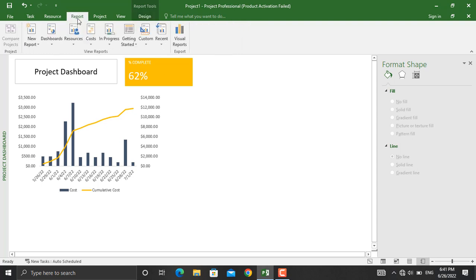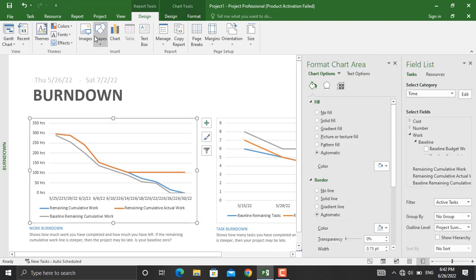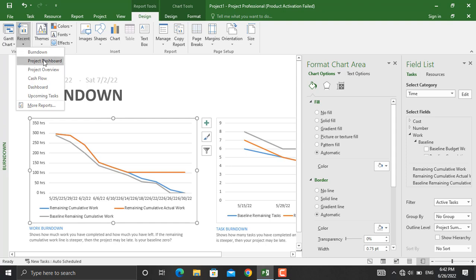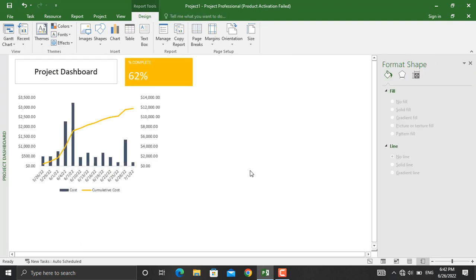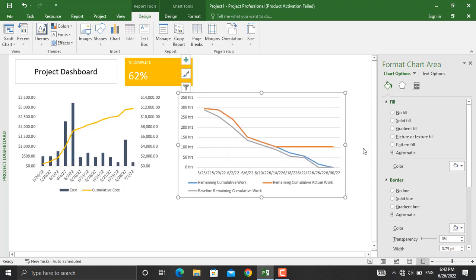Next, let's add the task burndown chart. Go to Report, then Dashboard, and select Burndown. There are two types of burndown as described in our previous videos: the task burndown (total number of activities) and the work burndown (total work hours). I'll select the total work hours version, copy it, and paste it into our project dashboard. If you want to do some formatting, you can do so as we did for the previous charts.